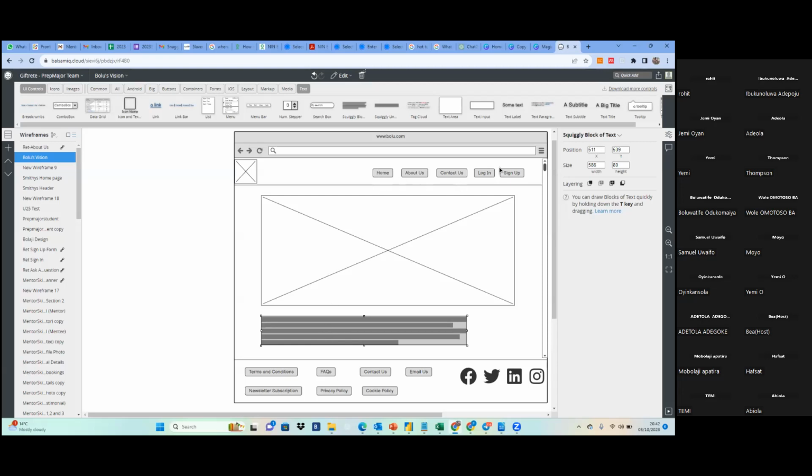These are the only things that have to be written on a wireframe: icons and menus. But you don't write sentences inside your wireframe. So what the tool has done for us is to provide a similitude of text. When you want to write a lot of text, you can use this to represent that this is going to be text. However, in your acceptance criteria, you will write whatever text is supposed to be on the banner. It's from your acceptance criteria that the developer will develop things.